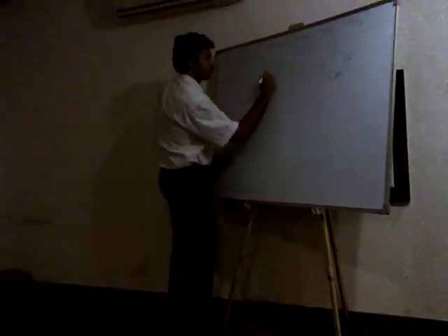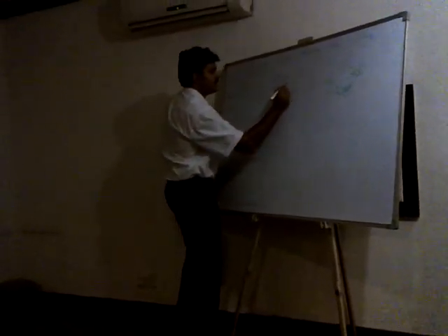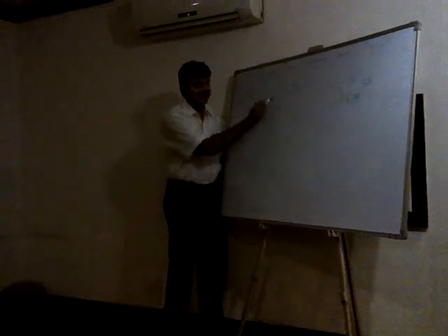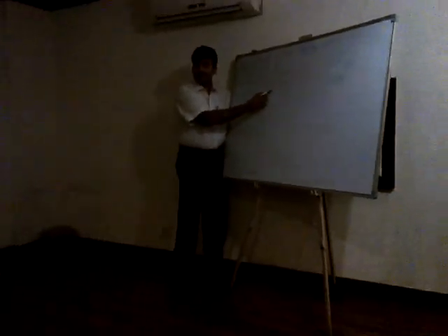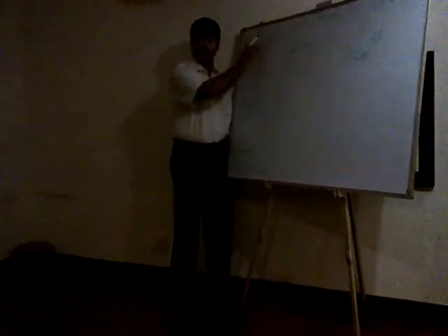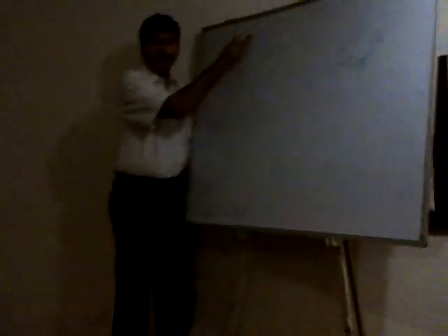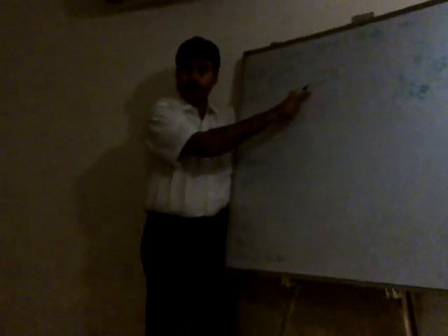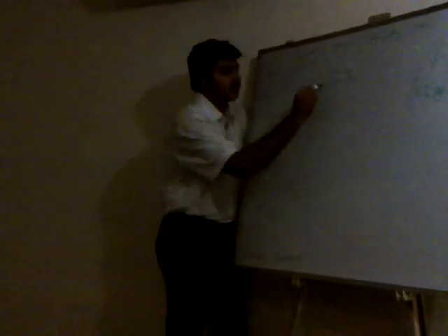Process? Collect requirements. In order to collect requirements, you would be collecting requirements on what? On the project. The high level definition of the project is there in the project charter. So the output of develop project charter, the project charter, is fed as an input, and you would be gathering requirements from whom? Stakeholders. Excellent. So the stakeholder register.